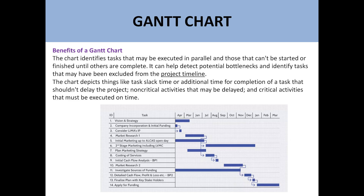The Gantt chart tells you about the activities which, if delayed, will cause the overall project to be delayed. For example, if market research 2 is delayed, then other activities like detailed cash flow and profit and loss will also be delayed. Activities whose delay causes the project timeline to be delayed are called critical activities, while activities which can be delayed without delaying the project are called non-critical activities.